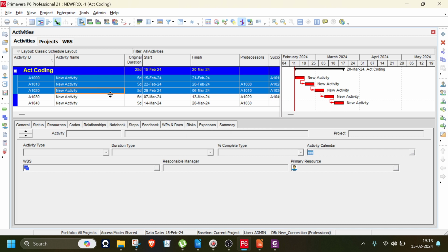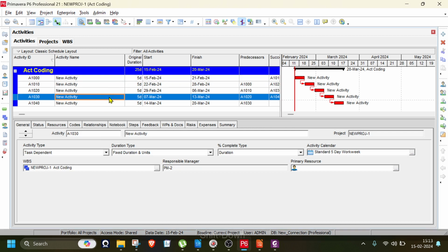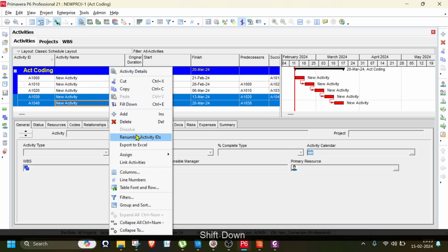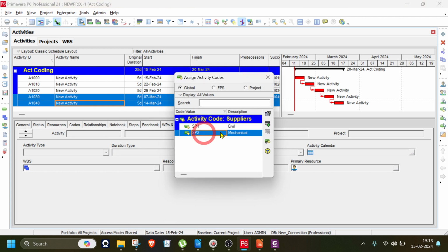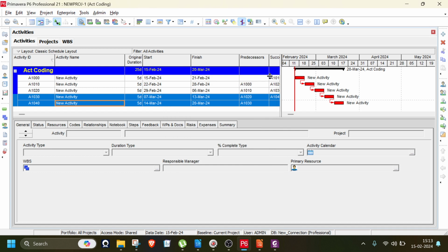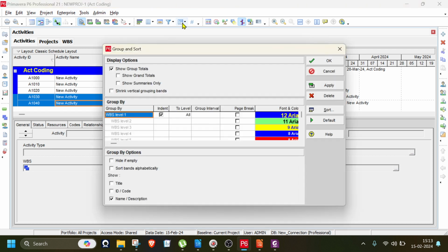Now I want to view it. You are going to group and sort. Go to suppliers, right? And we created a sheet called suppliers. This is here. Apply. Okay. Now it is categorized, coded, and created. Now soon after viewing the screen, what do you have to do? Go back to WBS. Otherwise, your project will get spoiled because you cannot work on this one, because this is only a viewing code on the coding part.